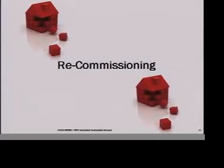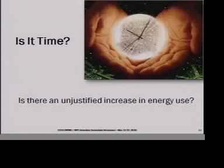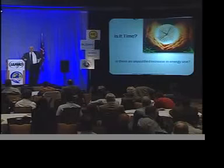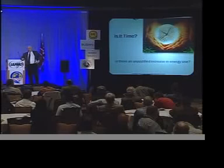Recommissioning. Okay, wait a minute. He just paid me to commission his building. Isn't that a one-time shot? Absolutely not. Is it time to recommission? If you can answer yes to any two of the following questions, then it's time to recommission. Is there an unjustified increase in energy use? Well, if he put three tanning beds in for his secretaries to use during their breaks, and the energy use went up, that's sort of justified. Now, what his wife thinks about the expense may be something else, but he can explain the spike in energy use. But if you don't know what it is, there might be something wrong. Time to get it retro-commissioned.